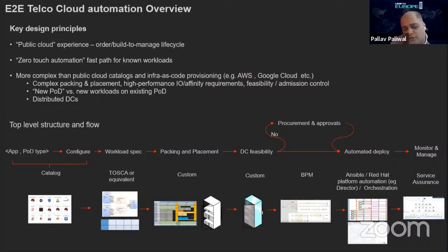Next, once you are ready with all these options, the flow you have maintained should also go into the procurement cycle, because we are not talking about a flow which is just to create a BOQ, but it should also be punched into a supply chain management system. That's where your procurement and approvals get done automatically. And once it is approved in the system, it's already ordered to the vendor, and you have the capacity ready to be delivered into your data center.